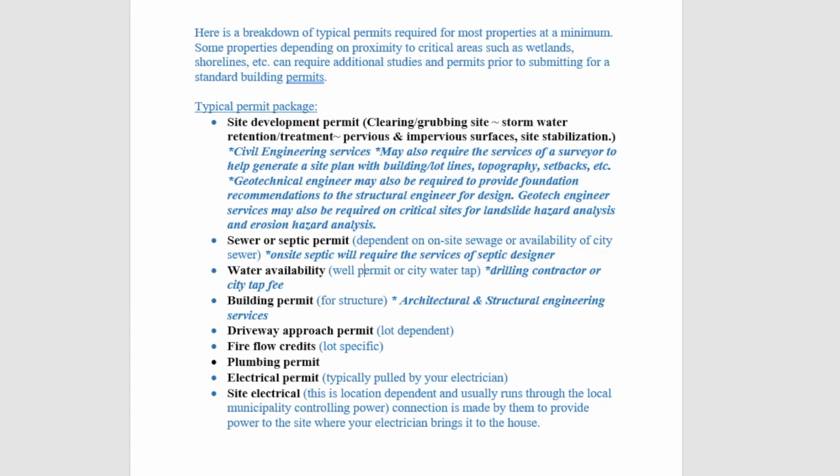A lot of this stuff, like Rocky Bay is a good example, we've been waiting on various things. We got through the water testing and had that tested. That was kind of a holdup. And then we started moving through our permits, but we had to handle the DOT access. So there's been little hiccups here and there, and granted we have other projects that we're working on as well, so this isn't the only one going, but that did delay us to today. It's been several months, I think, that we've had our drawings and all of our stuff submitted, and we've just been working through one issue or another. So you can expect delays with the county reviews. It's not something that goes quickly.